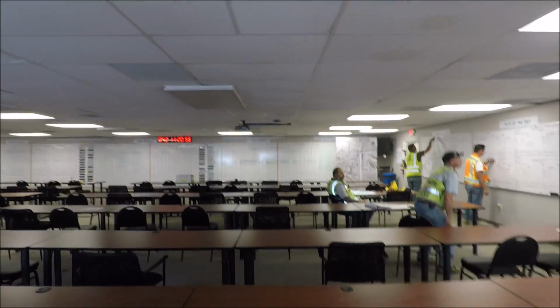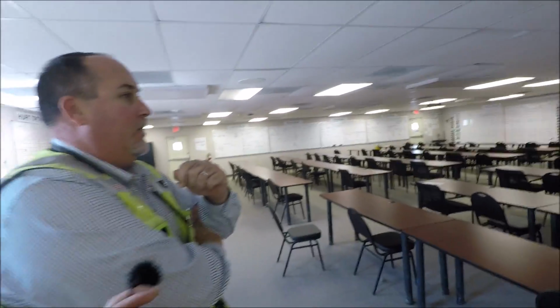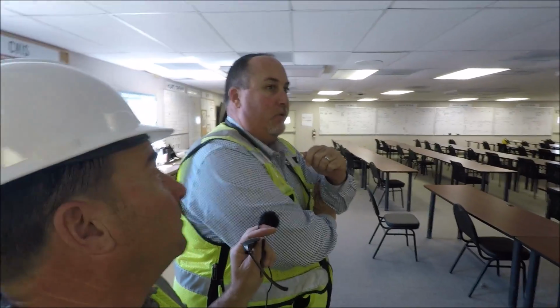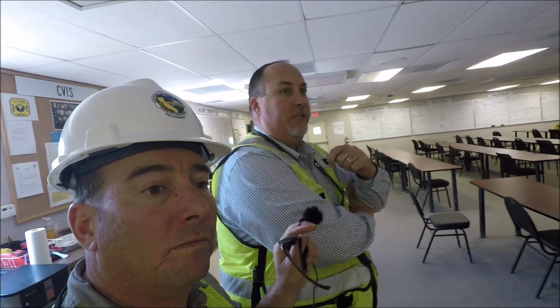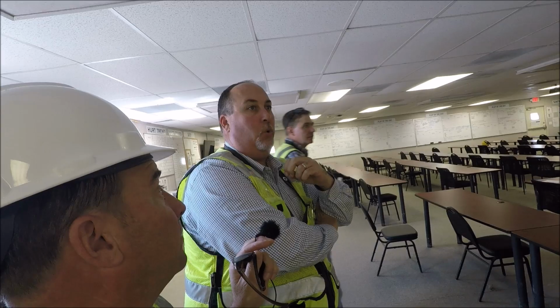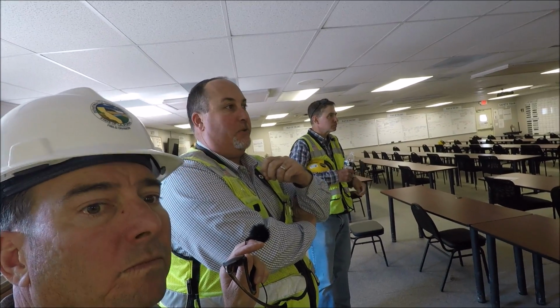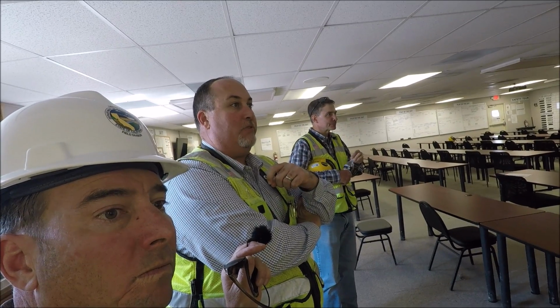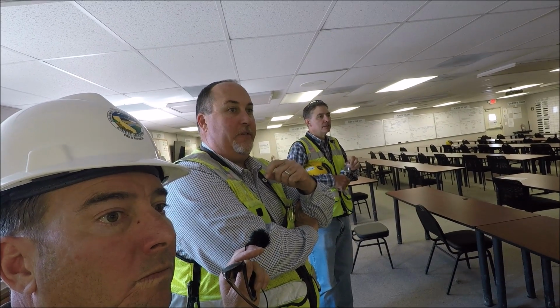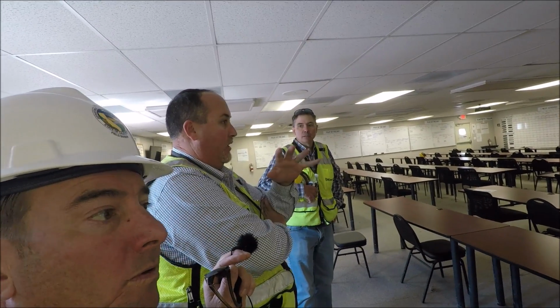We can come in the back door here on the other one. I'll show you. The main meeting we hold in here is called our Play of the Day meeting. We have it every day at 1 o'clock. Each discipline will go through what they're planning to do for night shift and then the next day. Every one of these boards is basically a different zone of the project, and a different superintendent's in charge of it. These guys are in here updating their board for our meeting that we've got in 20 minutes, and we sit down and roll through it. That's how we manage it on a daily basis.